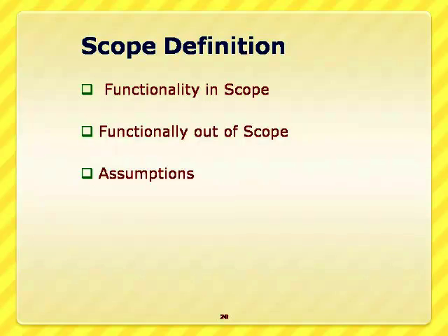Assuming that I am building a data warehouse in the organization, I have sufficient technical people. Based on that assumption, if I am building the data warehouse on Oracle, Oracle expertise is available. I am assuming that. These assumptions I started with. After some time, if I don't have technical people, then my project will be delayed. When I analyze why the project is delayed, I have started with the wrong assumption. That's why the project is delayed. So I can derive what is happening related to the data warehouse project implementation. Now let us go for a data warehouse implementation plan.